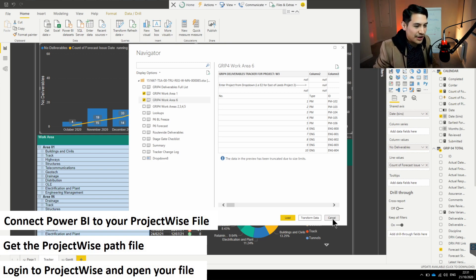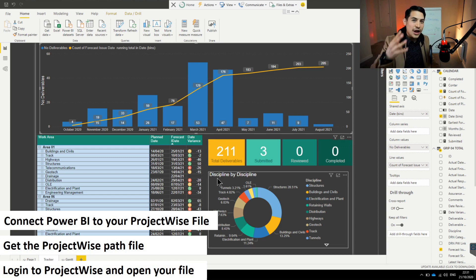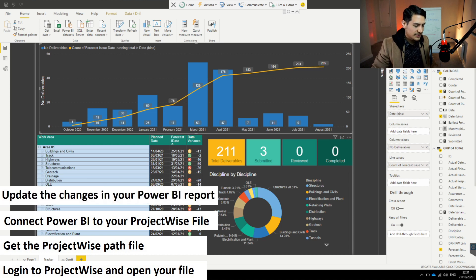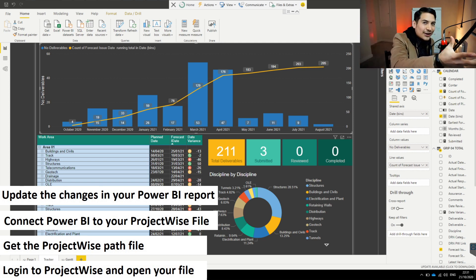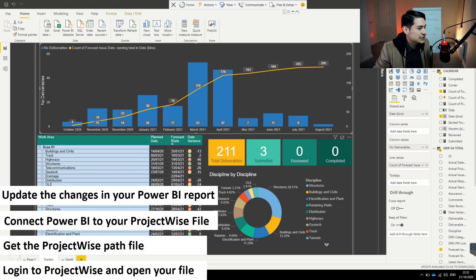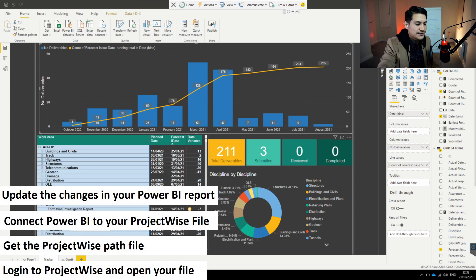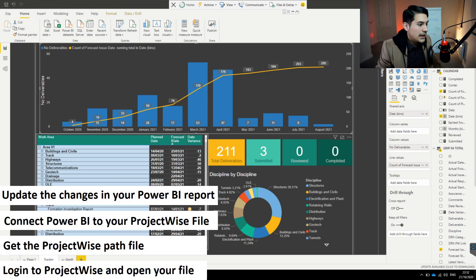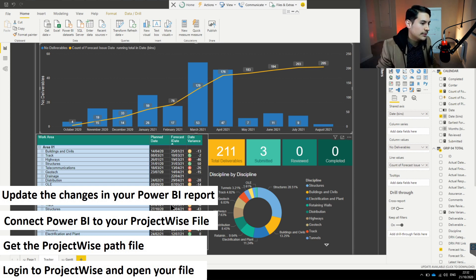Now for Step 4 — I want to update the changes I see on my ProjectWise file and see those changes reflected in my Power BI report. Navigating through this report, I can select Work Area Six and see the P-way track, drill down, and see all the documents and reports I need to produce to pass my stage gate. I can compare baseline dates against the new forecast and find any deviations, and drill down to the discipline level to see date variances.